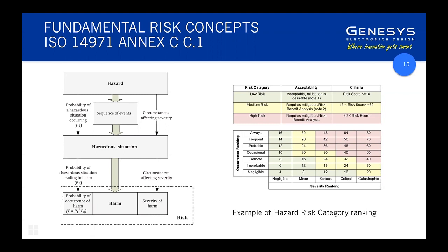Yeah, I find the hardest thing to do is to come up with a realistic assessment of P1, or the component parts of P1, when you don't actually have any evidentiary or factual basis on which to determine that. There's obviously the temptation to game the system and put it low so everything goes green, but I try and do the opposite. I try and take a very pessimistic view of the probability to highlight the risks and then make a determination of what a mitigation might be.